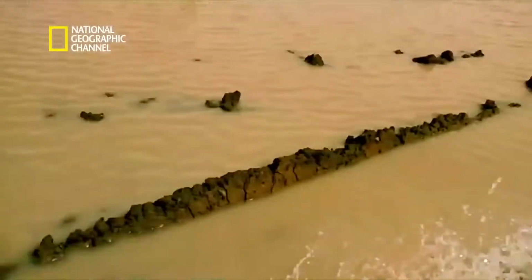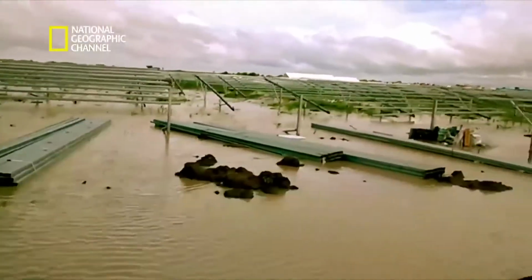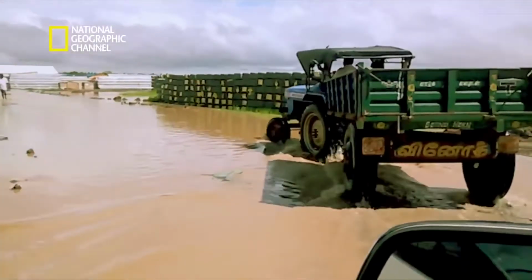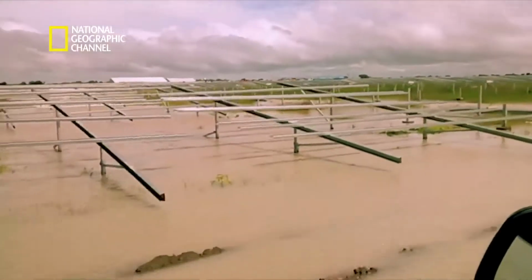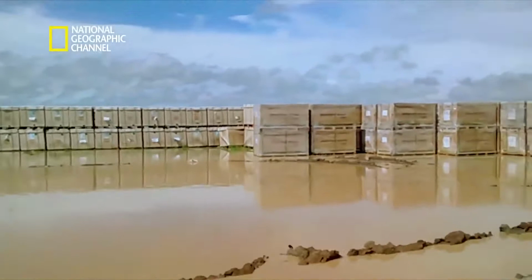The water may have been just knee-deep at site, but the logistics got hit hard when the team got word that Tuticorin, the port town closest to the site, was badly affected by the rain. Our whole site is filled with water. The Tuticorin port was completely stopped. The logistic chain was not working, and we were absolutely at a standstill for these 3 months.